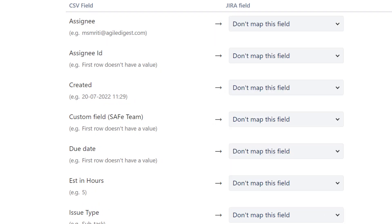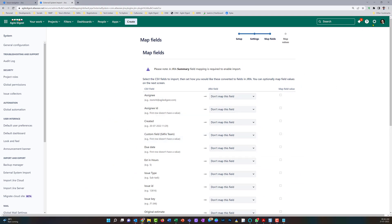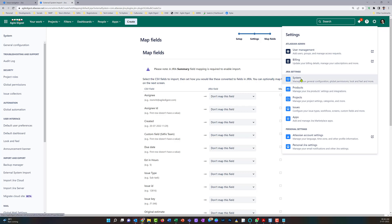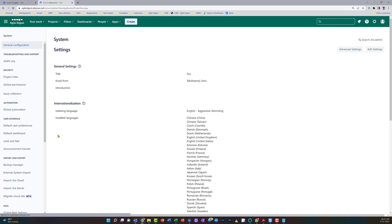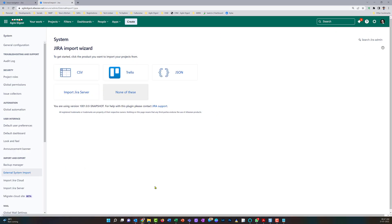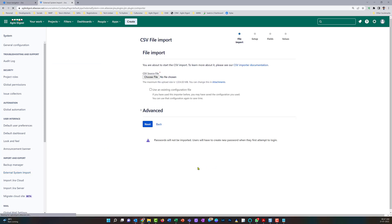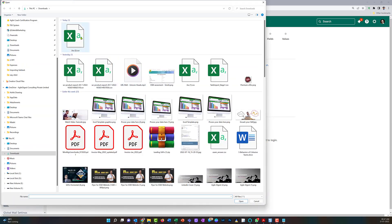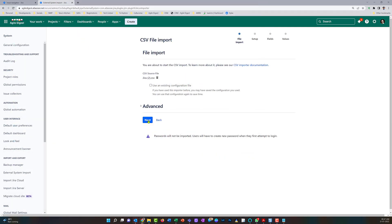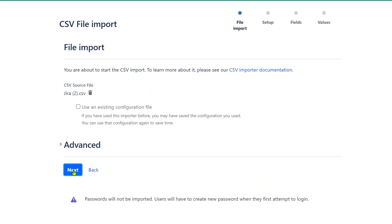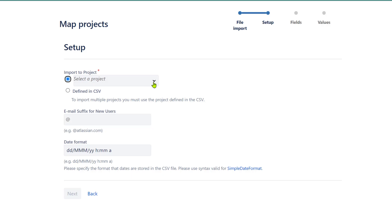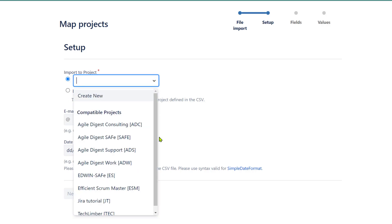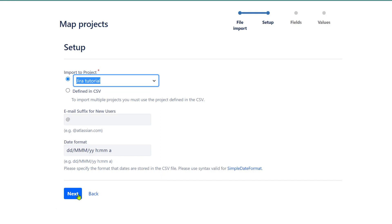We cannot import the original estimate from this area, but there is another way if you are the admin. Go into System, and over there you will see 'External System Import' — click on that. For this you need admin rights. If you don't have admin rights, you can pass this Excel to your admin and ask them to update it — for an admin it will take only a couple of minutes. I'll choose the same file here.